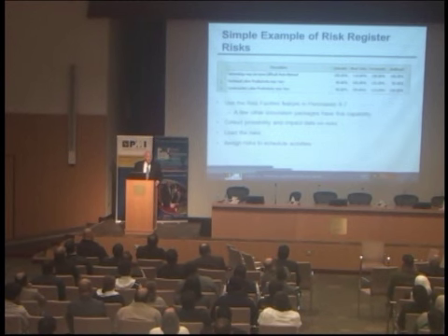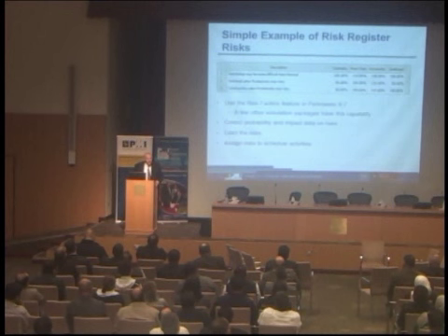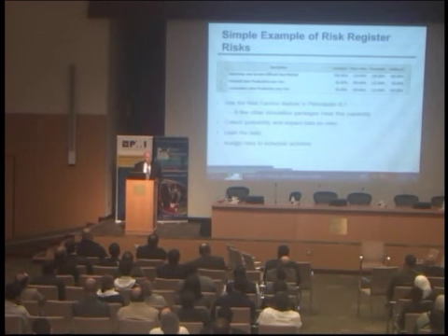A risk with 100% likelihood is not a risk at all. It's an issue, isn't it? Well, let me tell you, I argued that point at a conference in the year 2000. But in fact, if there is still an uncertainty about the impact, I don't care what you call it, we have to include it, right? So even with a risk that's 100% likely because it's happening now, if the impact is uncertain, we have to include it.